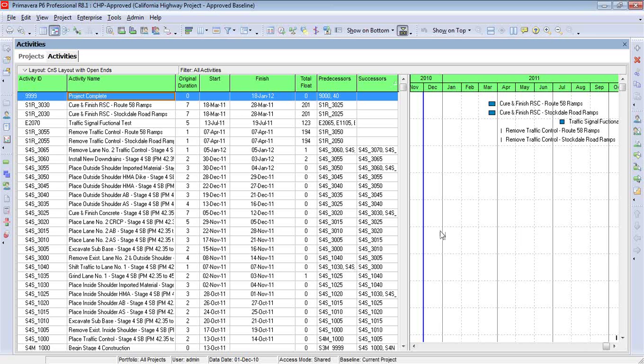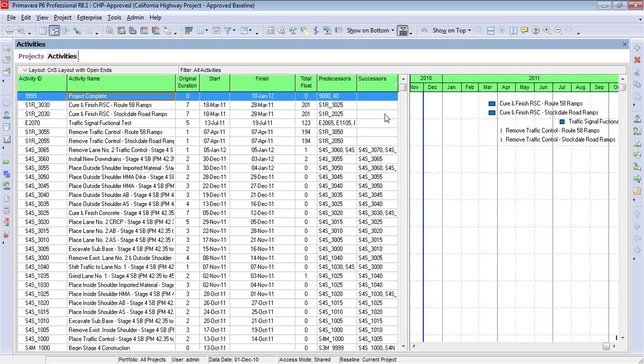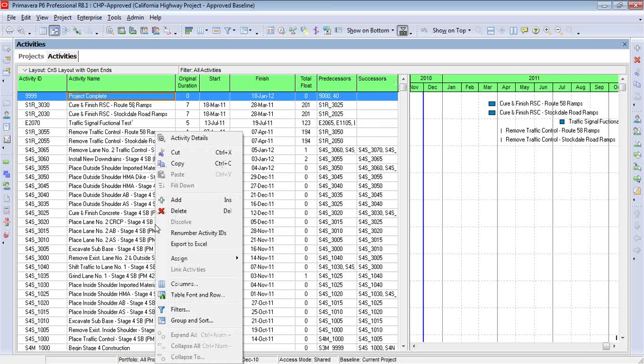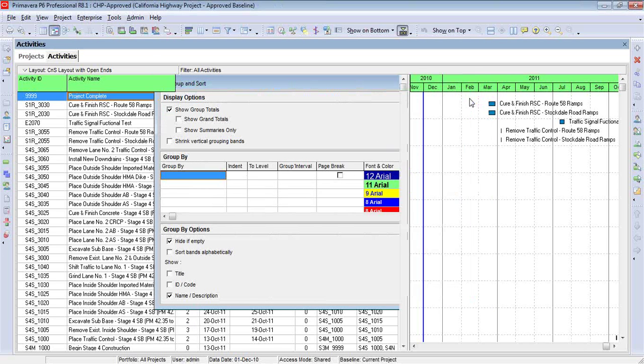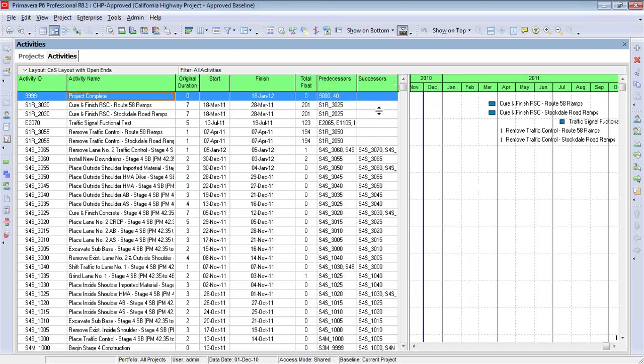Now, there's another way to check this, which avoids any other problems, such as the way that we've sorted it on the screen, whether or not a special filter might have been applied, because obviously if we're not looking at all the activities, we're not getting a complete list of all the activities that have an open end. Also keep in mind, for this method to work best, we want to take out all groups in the activity table. If you look at my group and sort, you'll see that I've taken them all out because I want to see all blank values together at the top of the screen. I don't want blank values interspersed within various groups.